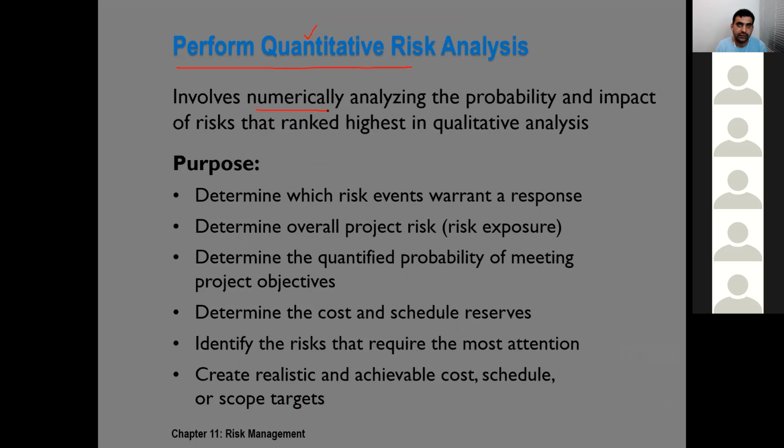And also here, the quality of data and availability of that data is very important. And the purpose is again the same, to determine the probability and impact. But now probability and impact won't be in the form of a range or low, medium, high. It would be in numerical digits.